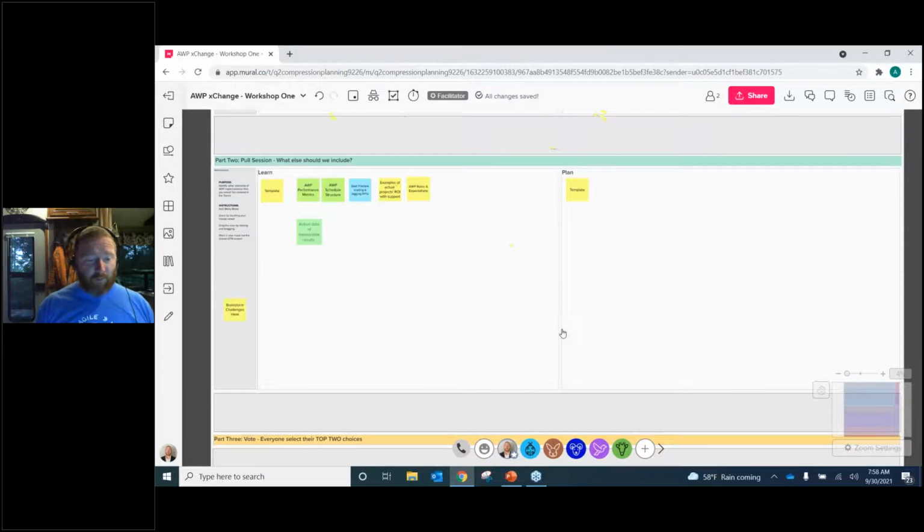So what we do for O3 as part of our implementations, especially with new clients, is we'll provide them with this data specification early. Then we'll take the data that they have, bring it in, assess it, and hopefully we're doing this early on so that it can still be modified as easily as possible. We'll populate it into our tool, see what the gaps are, and work through closing those gaps with the client. Because one of the key things, and Luigi, I know you know this from an engineering perspective, it's best to fix the problems at source.